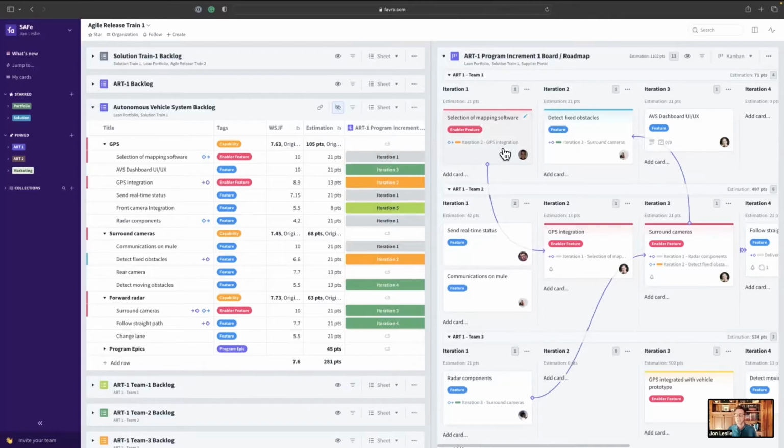Maybe we're doing PI planning again, if you're using Scaled Agile Framework. And this is a common technique to use to make sure that you don't have dependencies across teams. Now, you've probably seen physical boards that do this with all of the red strings connecting all the dependencies, right? And the whole goal is to resolve those dependencies before the program increment or the first iteration even starts.